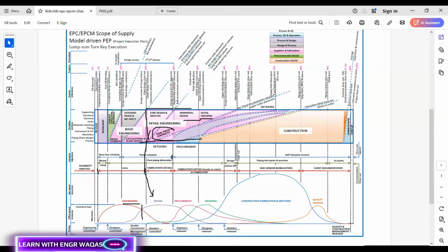So see, now after detail engineering, you can see that procurement is starting. What is procurement? Once your design is done, you need to take off material from that design, compile BOQs, BOM, right? What kind of material you require, what kind, total tasking, converting your design into the task sheets, that what you need to conduct, BOQs, bill of quantity.